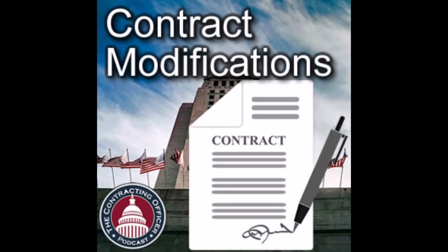Yeah, and the example would be, I got everything approved through our side, so I ask you for this proposal, and what do you mean you can't just sign this contract? I didn't see that as clearly as I do now that I'm on this side. So that's a good foot stomper, what you just said about the industry. Even if it's only $500,000, if it's a small business and it represents 10% of their revenue, the CEO is going to want to see that. Well, the CEO is busy, so it's going to take longer to get stuff done. Yeah, 10% could be a lot.